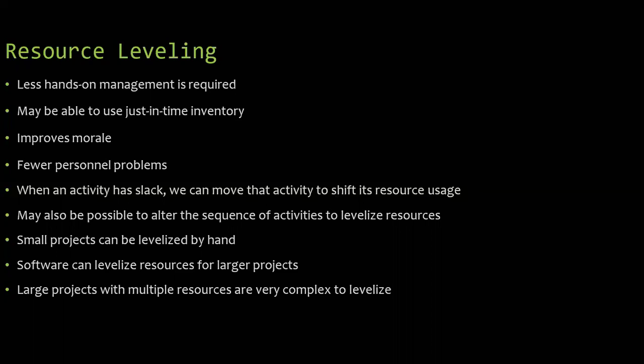Okay, we cannot shift that activity. That is the meaning of that. We cannot move the activity. We cannot start the activity early, when that activity should start only when the previous activity is finished. It may also be possible to alter the sequence of the activities to levelize the resources.